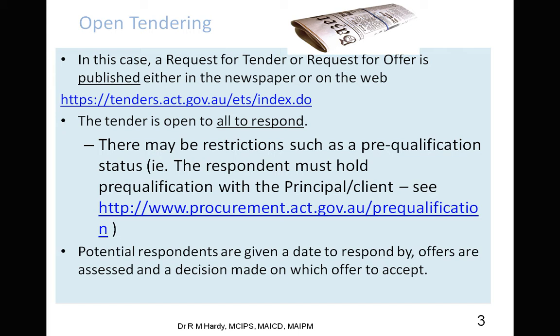How they're going to finance the project, and we'll talk a bit more about this when we come around to the contracts. But essentially, when you build something, you need to have a pool of money to be able to pay for stuff before you get paid. So their form of financing may just be that the client has to pay up front, and that's how they're going to finance it. But more often than not, they need to provide details of their banks and of their overdraft facility, so that we, as architects representing the client, know that they will be able to complete the project.